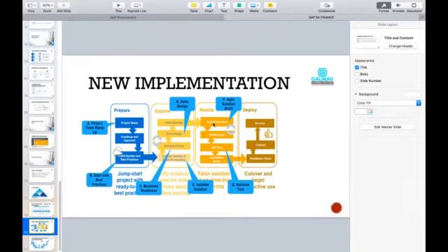Before you involve your developer, you discuss this FS with the customer, just to make sure that whatever you have written is the same thing that the customer is expecting out of that functionality, out of that customization. So you will create an FS document before you give it to your ABAPer. You will have different rounds of discussions with the customer.